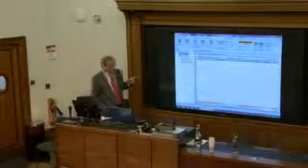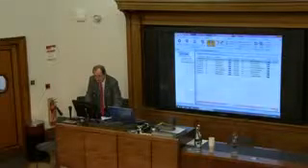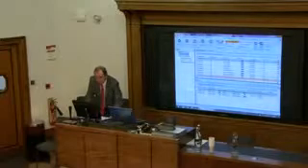Obviously with MSP you get logic on summaries, Primavera you don't. So immediately I know I've got a problem there. Some idiot's done a logic into a summary. I've got to get rid of it somehow. I can list all my start relationships, and more importantly, I can list my redundant logic.